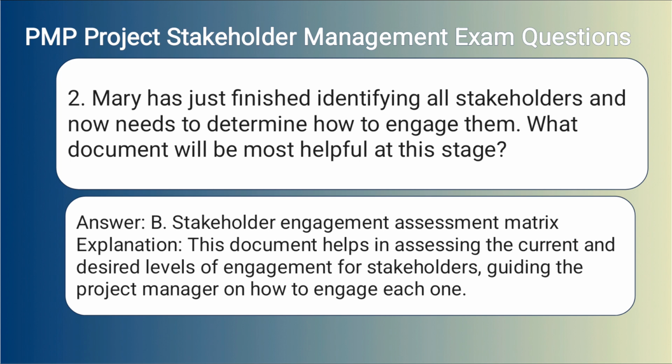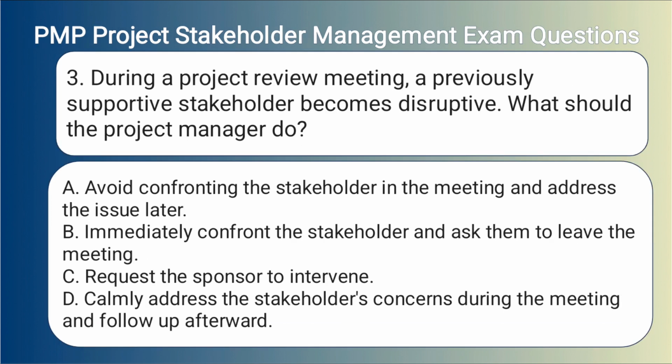Answer: B. Stakeholder Engagement Assessment Matrix. Explanation: This document helps in assessing the current and desired levels of engagement for stakeholders, guiding the project manager on how to engage each one.